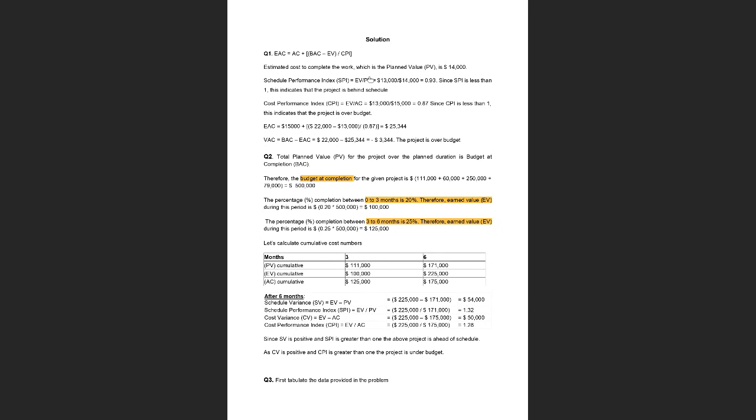I think for CPI, you are taking the value of SPI here. But it is the cost performance index. The difference between SPI and CPI is in the denominator. One is actual cost and the other one is planned value. So you have to consider the actual cost. Can you try to do it again using the actual cost? I'll wait for some time.